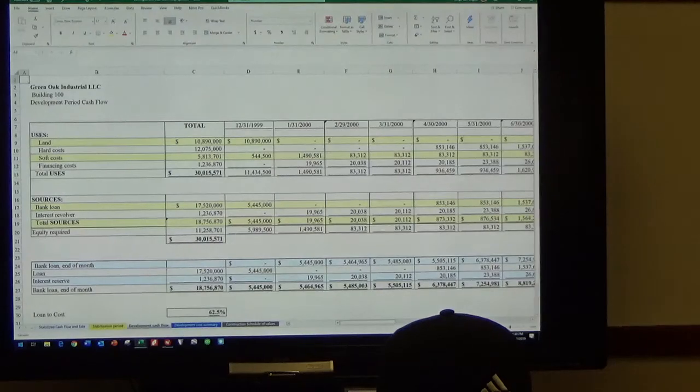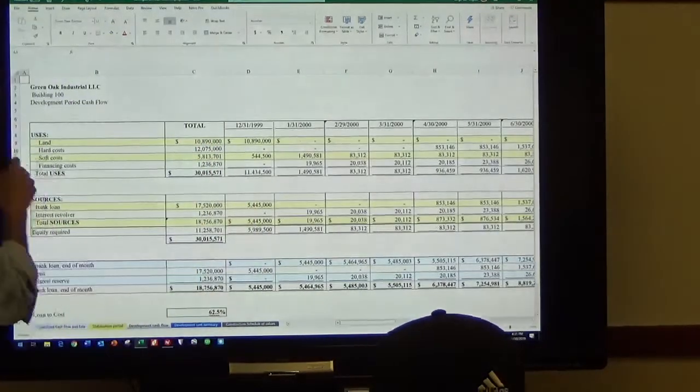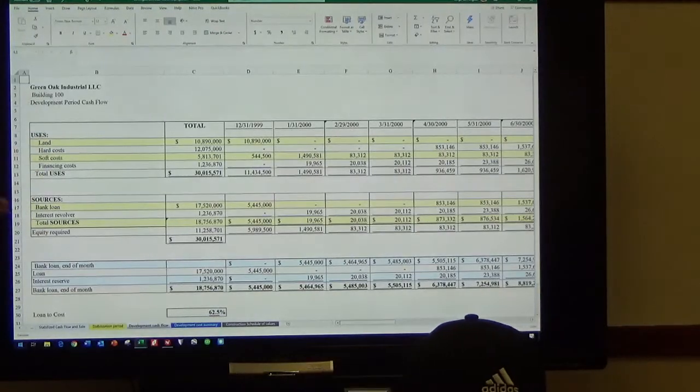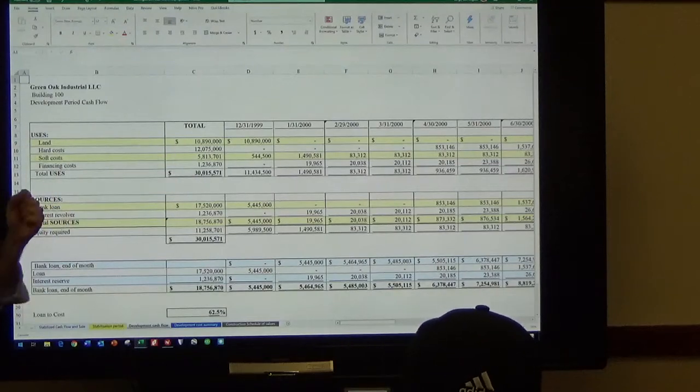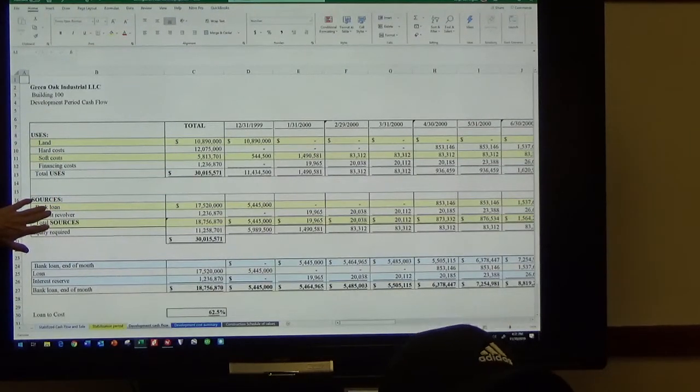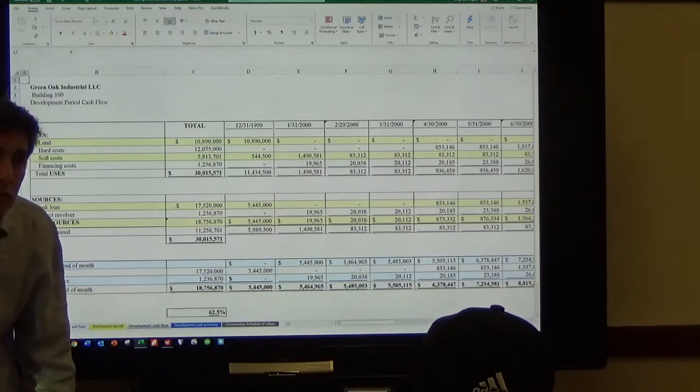Okay, now, this is a sources and uses statement. We saw this in video 11. We already did a development budget. In a development budget, our revenues are cash inflows as sources, and our costs are expenditures, outflows, as uses. What are our uses here? We got to buy land, we got to pay for hard costs, and we got to pay for soft costs.